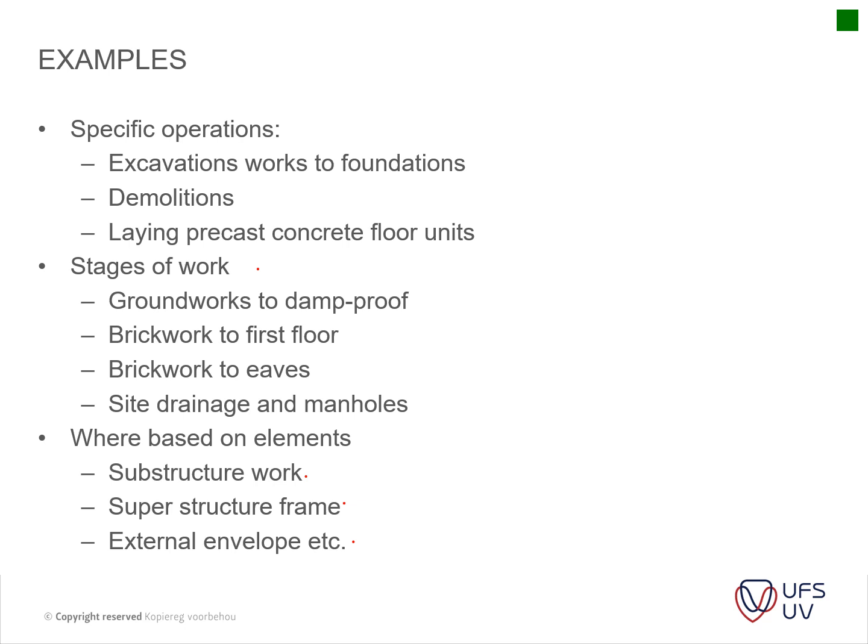You can structure your method statements in any of these three ways, but it's just to keep a logical flow of it. What the guys usually do, what I've seen and what I usually ask for, is to do your method statements in accordance with your program. So for instance, start with your site clearance method statement first, and your excavations first, and so on.